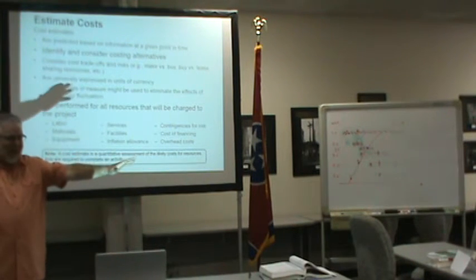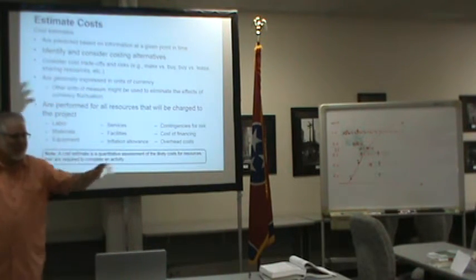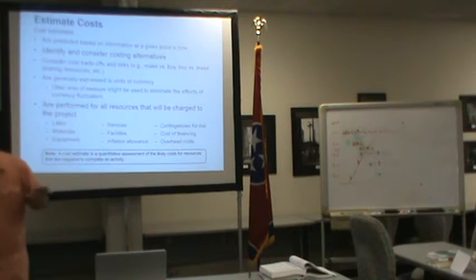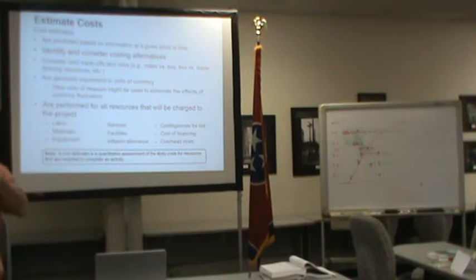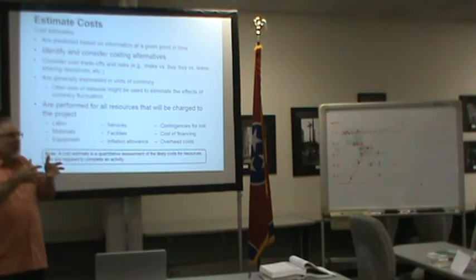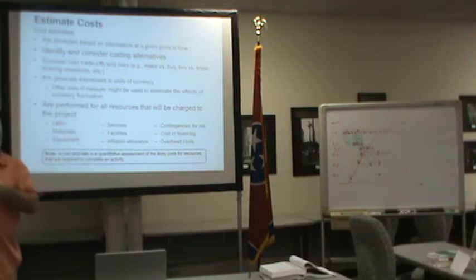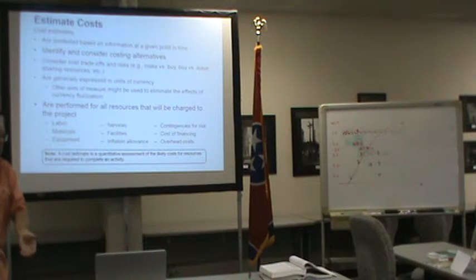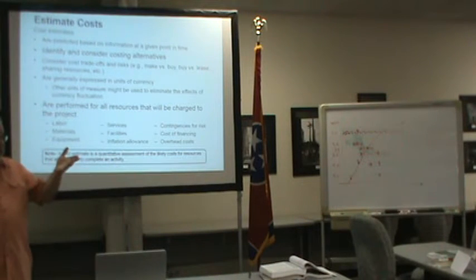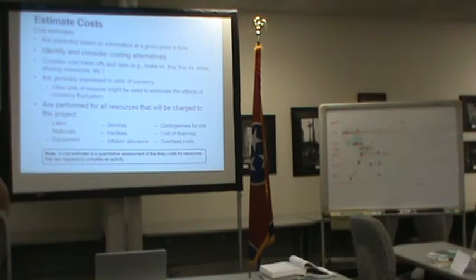All joking aside, because I'm sure you're saying all this tongue-in-cheek, the point there for us is to recognize I've got to understand the environment, because there are environmental influences on estimating. And if I'm doing something in a hazardous environment, if I'm doing it underwater, if I'm doing it in space, if I'm doing it in a nuclear environment, it's different.